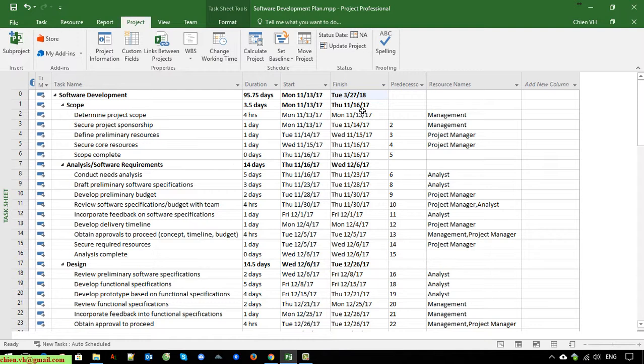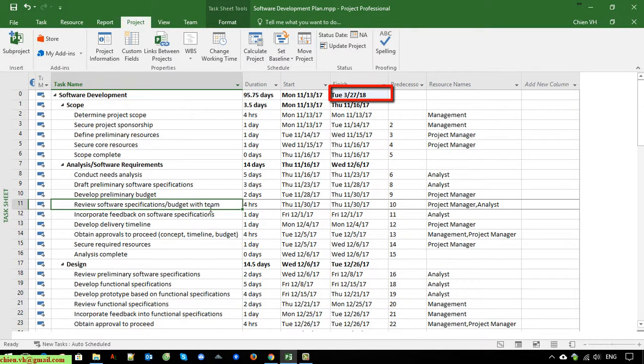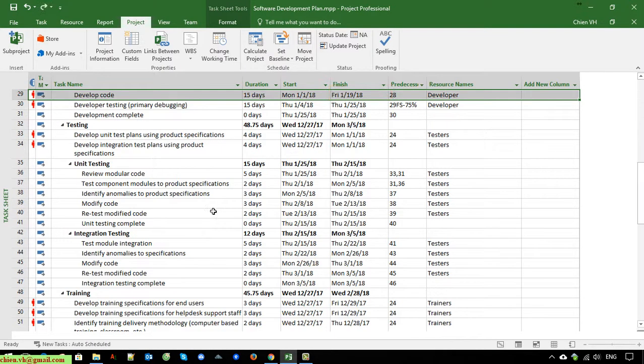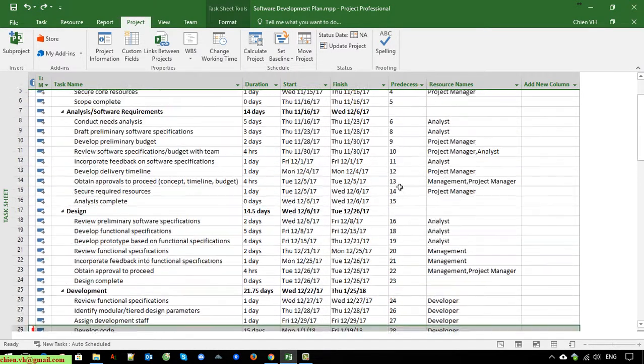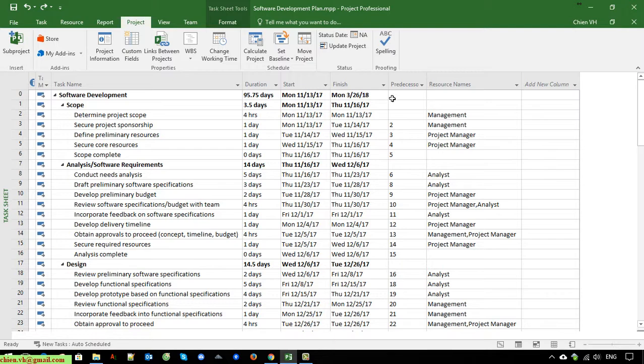Now you can see here the finish of this project has been updated. Before the change it was the 26th, and after we include one day for New Year, it will be increased to the 27th.